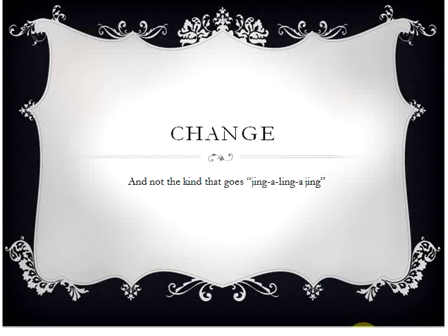If you come back to the change control meeting, you're the IT analyst that comes back to the change control meeting and says, yes, we've approved the change. Here's the next steps. It's going to take us 2 weeks to get it built in the test environment. It's going to take 2 weeks for the super users to test it at the level of comfort to make sure it's working. We need to plan for education, which right now nurses are 2 weeks into their 12-week schedule.